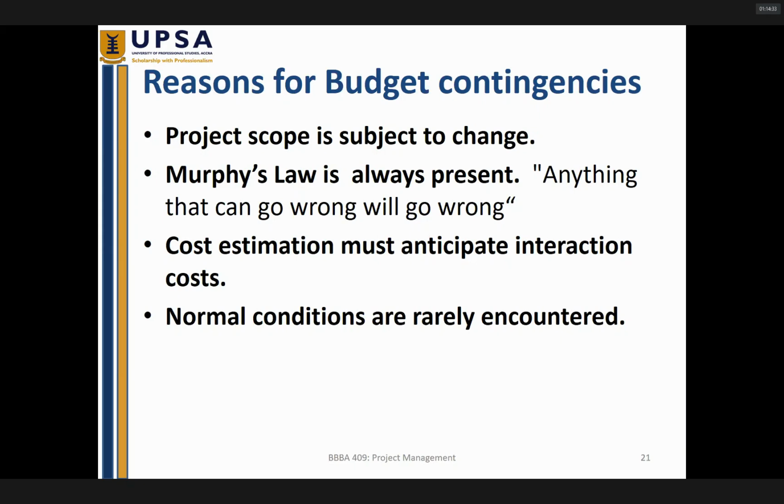So in that case, and I remember explaining expedited cost, sometimes it's possible that expedited cost could be a contingency budget. Here, the contingency is planned. There is a conscious effort to put these extra allocations aside with the intention to cater for unexpected issues.